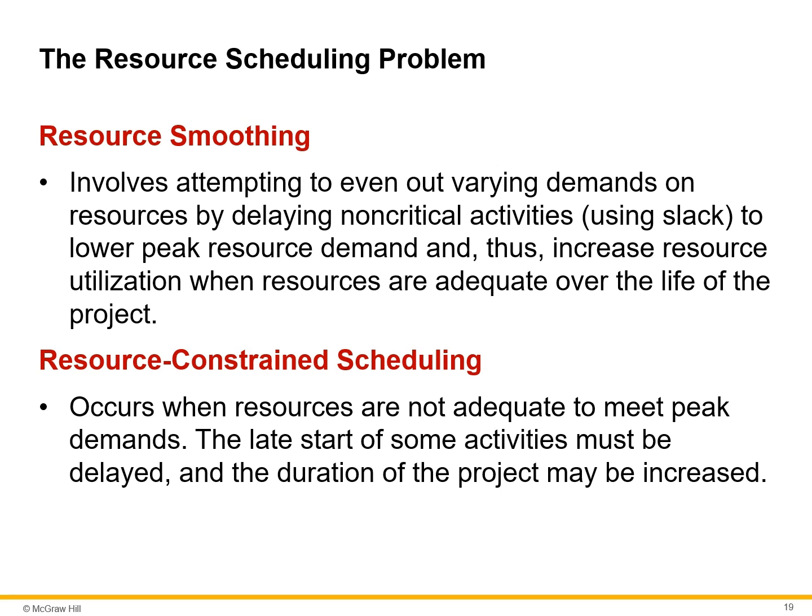An additional consequence of failing to schedule resources is ignoring the peaks and valleys of resource usage over the duration of the project. Because project resources are usually overcommitted, and because resources seldom line up by availability and need, procedures are needed to deal with these problems. So this lesson will deal with those issues and address methods available to project managers for dealing with resource utilization and availability through resource leveling and resource-constrained scheduling.